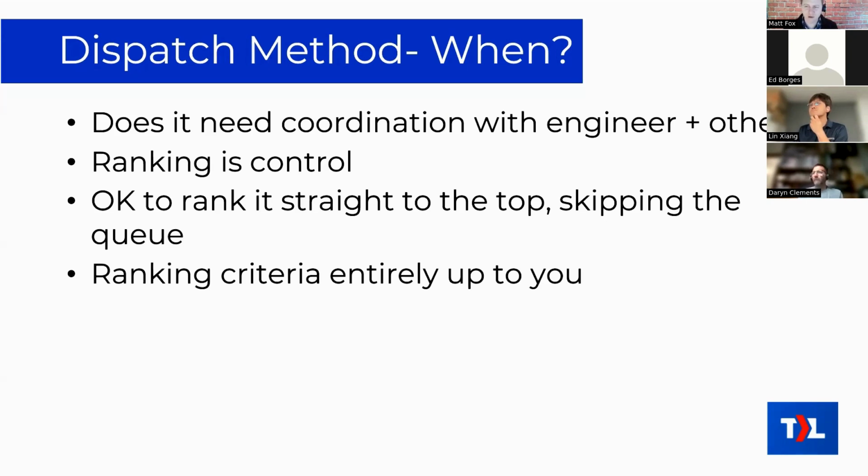Or I should also say, if there is some real accepted reason that a ticket needs to be done at a certain time and day, such as some sort of network cutover, and you ask the customer, okay, when can we do this cutover? Well, they give you a time, and that should go in the calendar. So those are really the only two reasons that you would ever want to put something in the calendar. And that's usually a minority of the work. So most of the work is not going to go in the calendar.